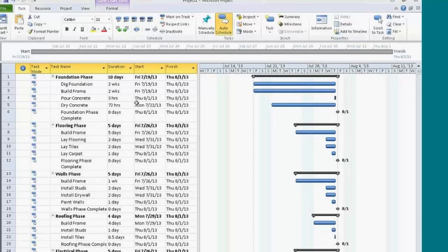You'll also notice I haven't touched any of these dates. You're not supposed to. The moment that you touch either one of these dates, it sets unreal constraints within the project. You then start to get messages like "this task can't move before this task." The moment you start to get those types of messages, you know that you've probably set some constraints that aren't real constraints.